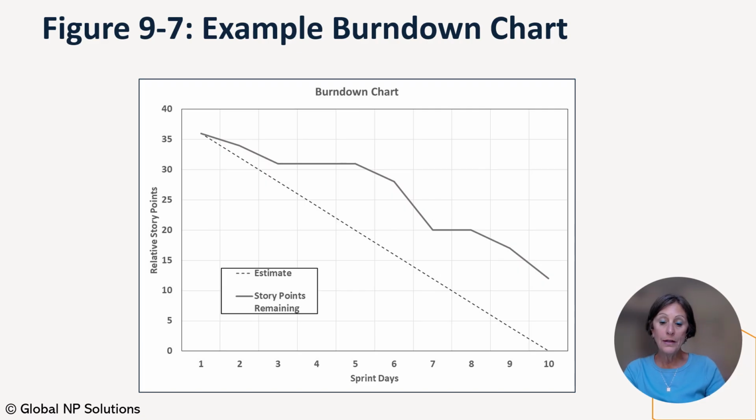Sometimes there is a legitimate reason for falling behind during one sprint, and the tasks can be completed during the next sprint. With recurring incompletions, however, the Scrum Master must consider whether too many user stories are agreed upon during the sprint planning meeting, or if estimates are incorrect and inaccurate. The Scrum Master must intervene with continuous learning and experimentation, especially during initial sprints, to ensure that overall release dates are met.